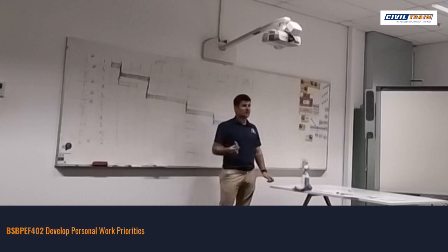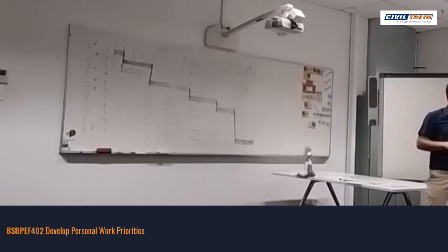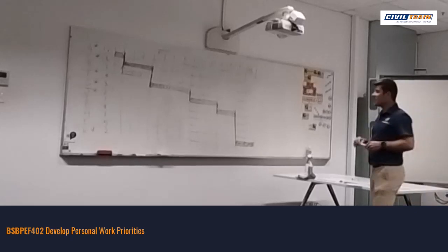What's that telling me? I call it a floating task. That's the time you've got to do it. I can't start it any earlier because of the arrow, it has to start after, but it's telling me that I've got a day up my sleeve. I can slide that way.